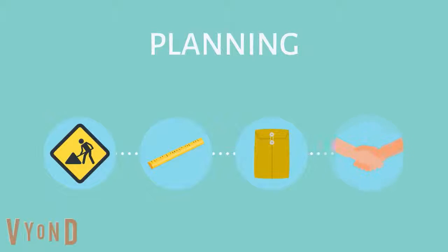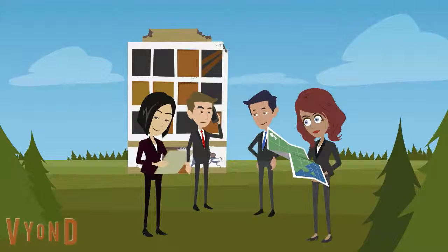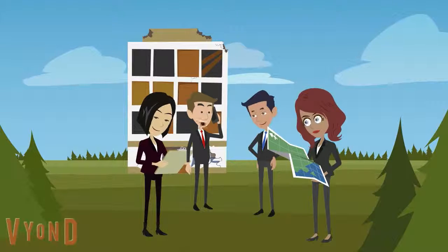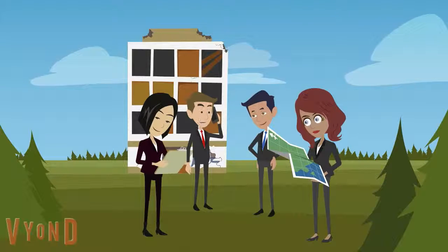Before the architect starts to prepare the drawings, site analysis is carried out by the architect to determine whether the land is suitable for the following development. In the process of site analysis, the land surveyor conducts site surveying and soil investigation as well as the site measurement. The land surveyor also assists the architect in the documentation of site conditions besides having a pre-consultation with local authorities regarding the planning application.